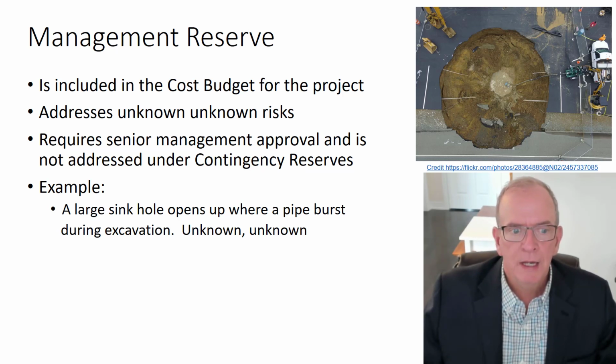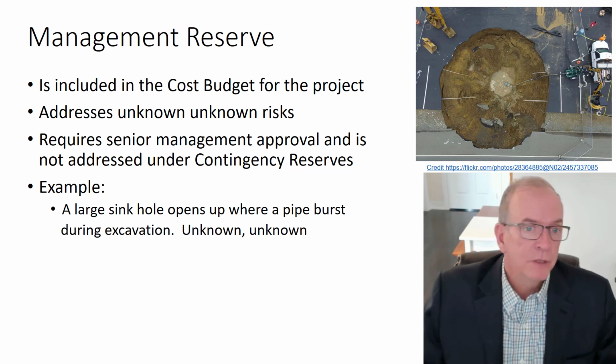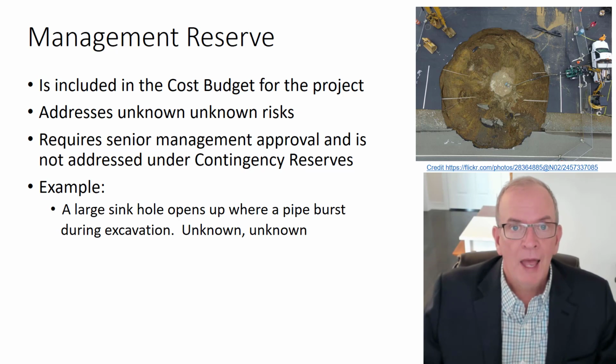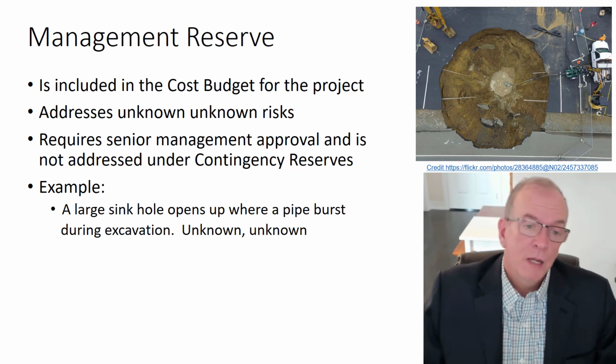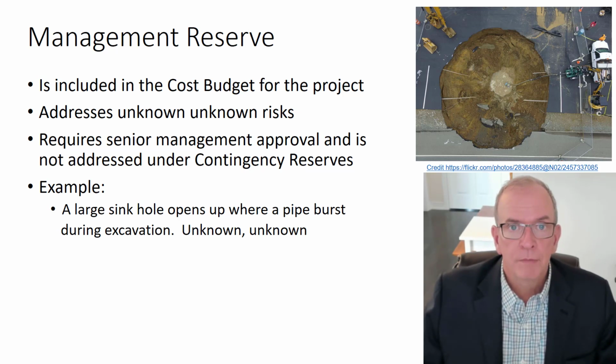Now, did the contractor make the pipe burst? Did it burst just because of age? At any rate, it would be good to have a reserve in place for these unknown events. You might be able to utilize insurance, and then you might not have to utilize the reserve, or in the short term you might have to utilize the reserve, and in the long term maybe you could get it back with insurance or prove that it wasn't caused by you. But at any rate, you do have something put in there for that kind of event.